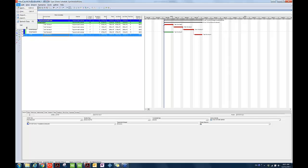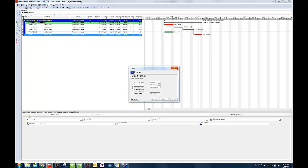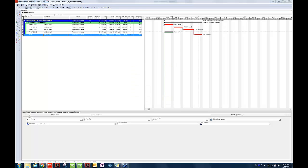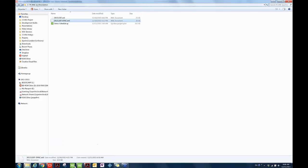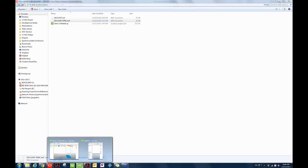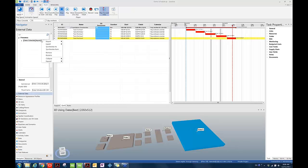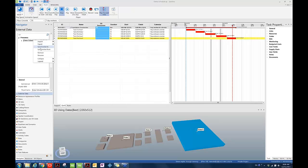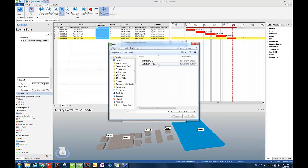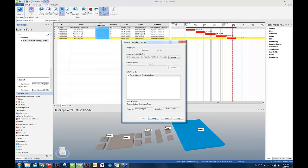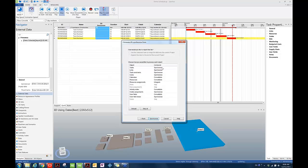Then he does the same thing. He exports the updated schedule into a P6 XML file format, and then passed this file to the Synchro user. This is the updated P6 XML file. And then the Synchro user is now ready to use the feature Synchronize From. In Navigator External Data, underneath Primavera, select the right source project, and then choose Synchronize From to bring the updated P6 XML file and the updated schedule into Synchro.